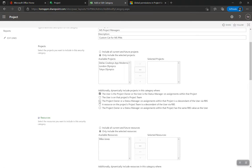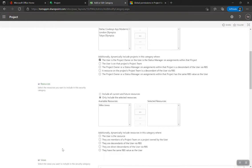There's also an RBS option: the project owner or status manager and assignments within that project is a descendant by RBS — the Resource Breakdown Structure. This is a complex part of security. Essentially it's the hierarchy within the organization. For example, I'm a manager of five people — I want to be able to do everything on their projects, but not access another manager's team's projects. So I can edit all of my team's projects but not someone else's.